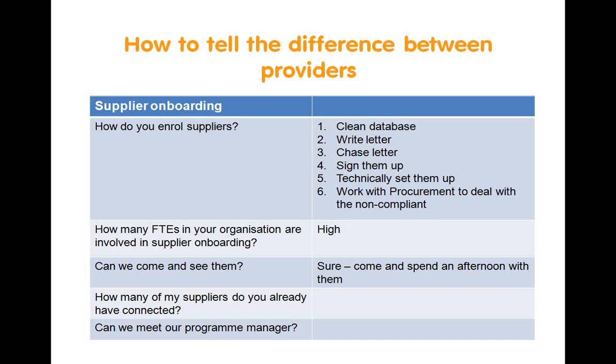You want the service providers to chase up the suppliers for you. You don't want to be calling them. That's not your skill set. That's the skill set of the service provider, and let them get on with it. You want the service provider to sign them up and technically set them up. It's fiddly. You don't want to be involved in that, so let them get on with it. And you want them to understand that they will work with procurement to deal with the non-compliant suppliers and find a way to get them on board quickly.